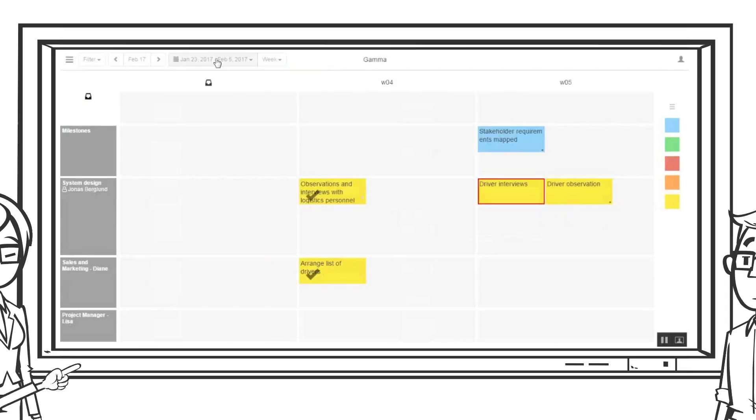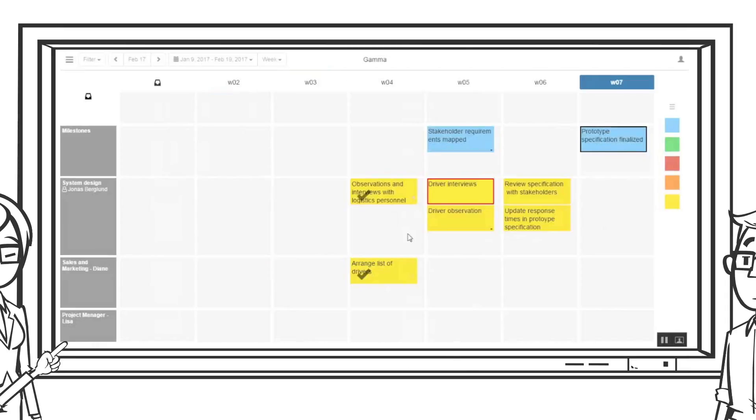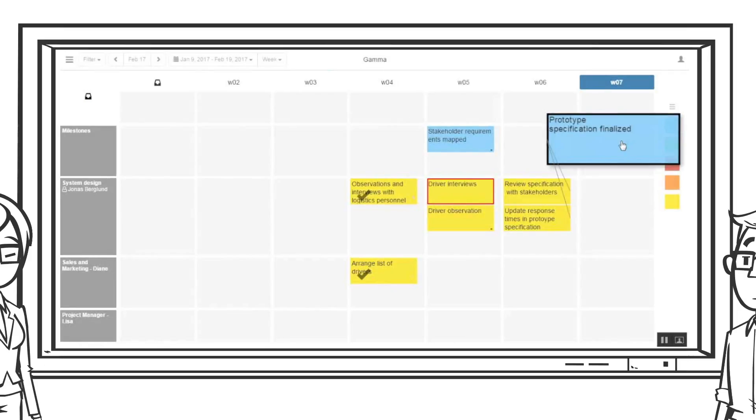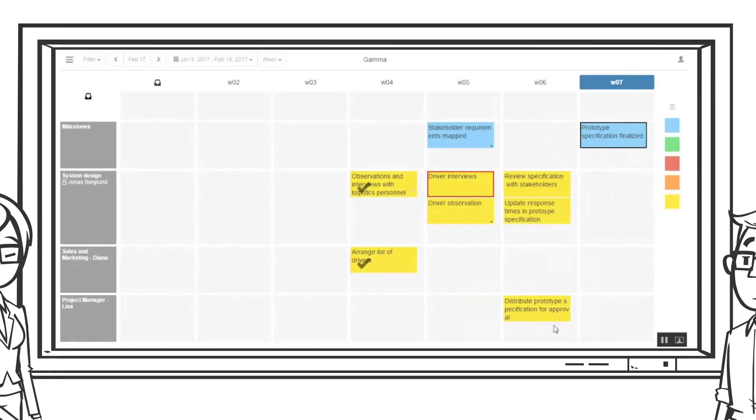Zooming out from a two-week view to a six-week view, the team notes that an important milestone is coming up. Lisa plans the specification for approval in week six as soon as Jonas finishes it and connects it to the milestone.